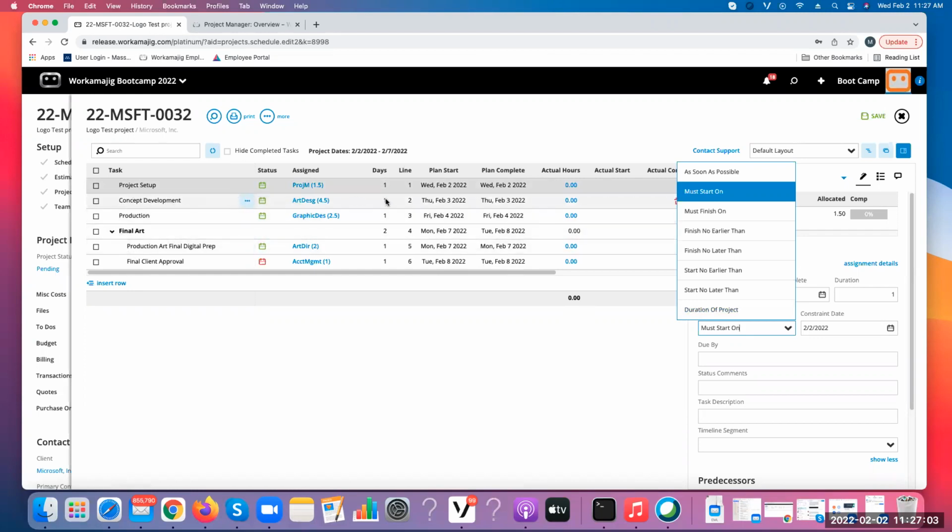Well, you don't want to have to come up with how many days are in this year and try to back out of that. If you just say duration of project, the system will automatically calculate the days for you, and it'll select whatever you have as the project due date. So if you opened one on 1/1/2022 and it went through 12/31/2022 because it was overhead, it would calculate that.